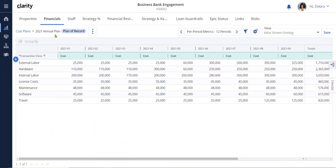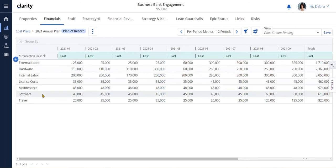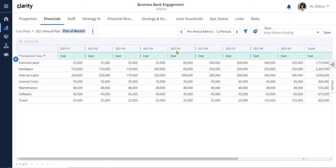Value stream budgets go beyond headcount or teams to include non-labor expenses, such as hardware or software, and are planned over fiscal periods. Here we can see that she has a hardware budget of roughly $2.3 million. Of course, these plans can be revised as needed to support business goals.